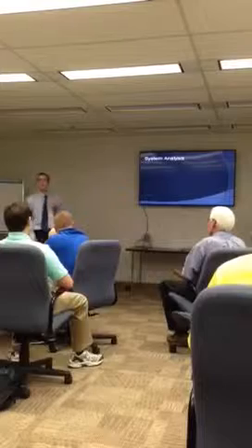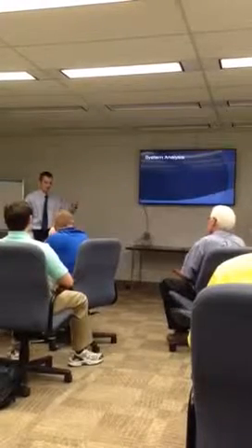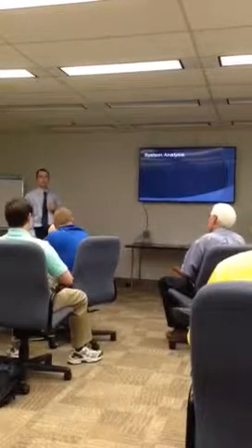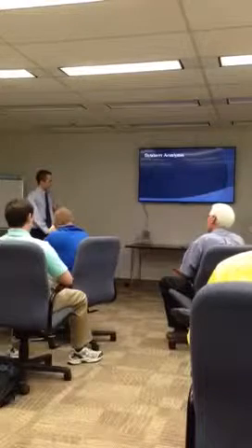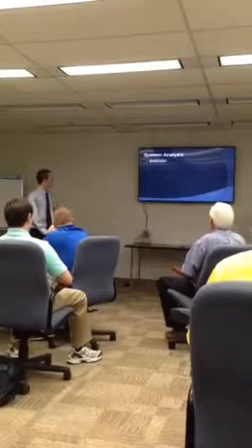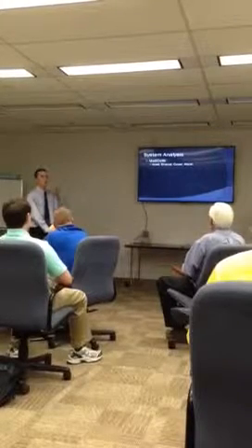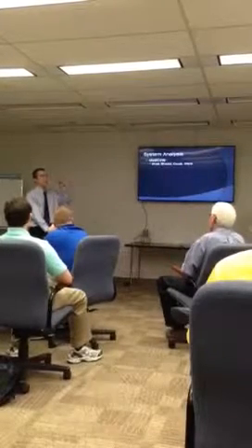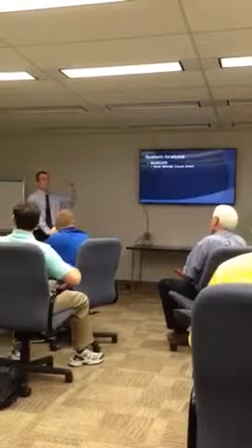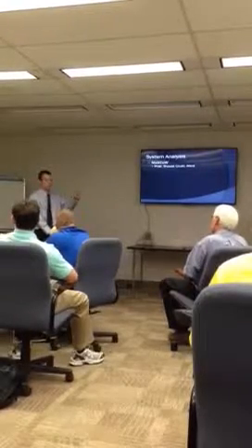I wore two hats. I did business analyst work as well as development. And so some of the analysis that was done was a MoSCoW, which has the must, should, could, won't, which was pre-development, figuring out what the requirements are, what the project should do, what it won't do, etc.